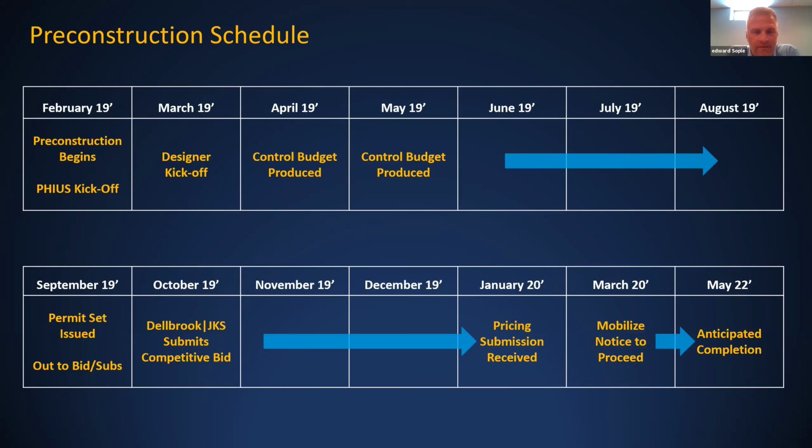It went out to competitively bid again in October of 2019. We retained, and we were still the low bidder and most responsive bidder. And ultimately the project landed at that 1.5% to 2%. Ended up being, I think, 750,000. I forget right now because there's so many other moving parts and pieces when the budget was finalized. But we started out at 4.5 million, which obviously wasn't going to work.